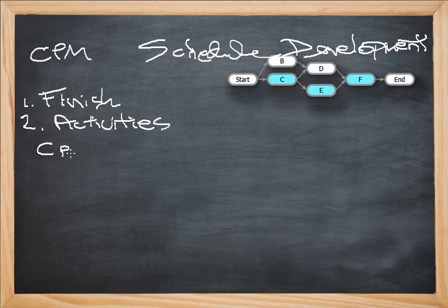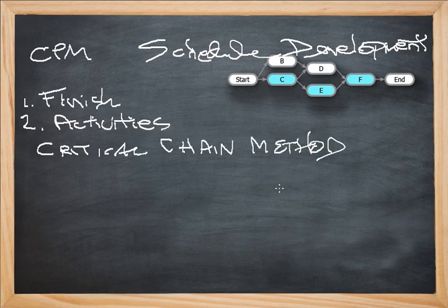Then we have something called critical chain method. It uses theories by Eliyahu Goldratt, which provides a unique way to view and manage projects' uncertainty by applying more resources in a way that lets you buffer time between activities so that you'll know how to start work as late as possible. This is definitely more complicated, but has benefit especially with software development, where the resource application and complexity of completing the work can be pretty daunting. Applying the critical chain method will usually adjust the network diagram.